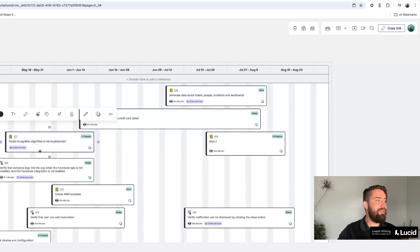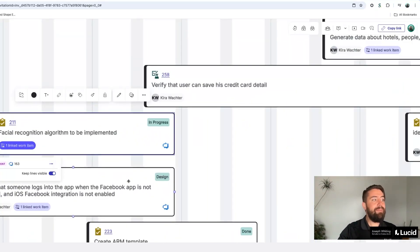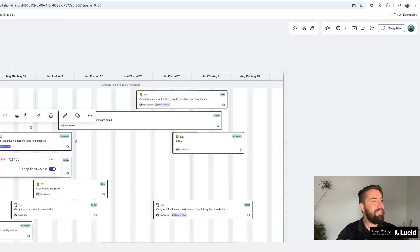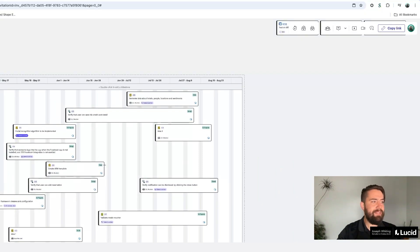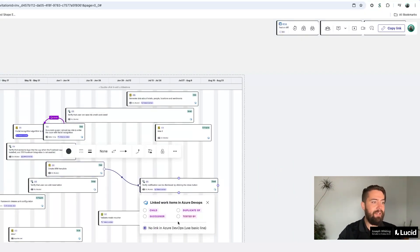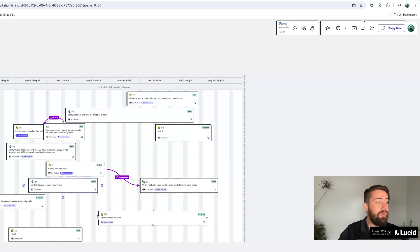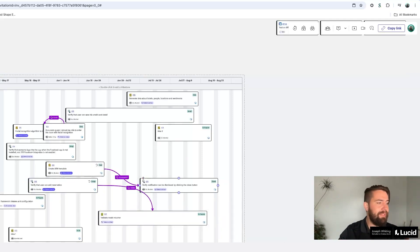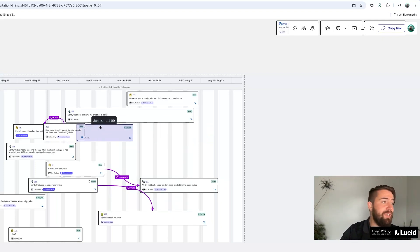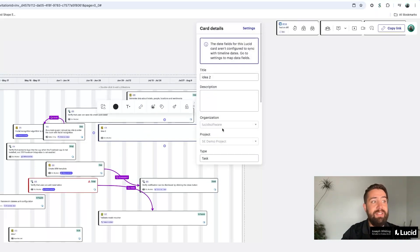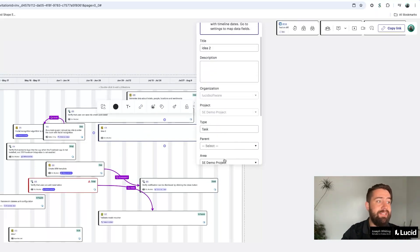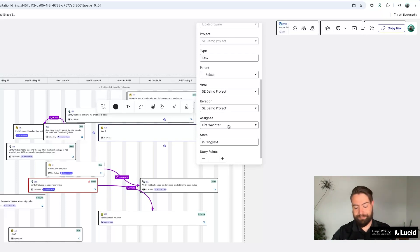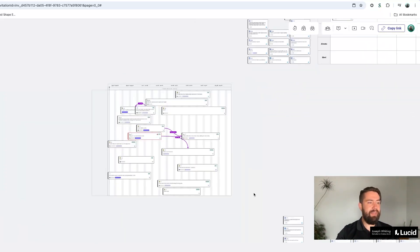As I move this, it is bi-directionally synced and it maps back to Azure DevOps. Now, as I move these around, you'll notice that we have some of these that are linked work items. I can import these and they'll actually automatically show up with that linking. Now, if I'm mapping this out for the first time, I can also draw and create successors, et cetera. I can map out dependencies within Lucid that are bi-directionally synced in Azure DevOps. So I'm going to make this a child, et cetera. You can map those out. Once again, as I move the time that's bi-directional, as I change the status, the owner, et cetera, these all go back into my Azure DevOps environment and automatically are updated there.